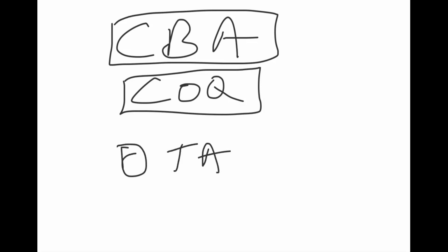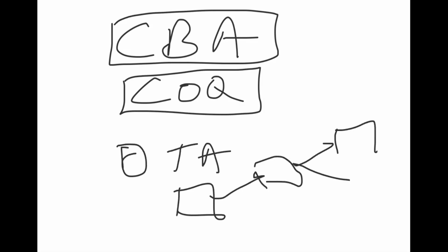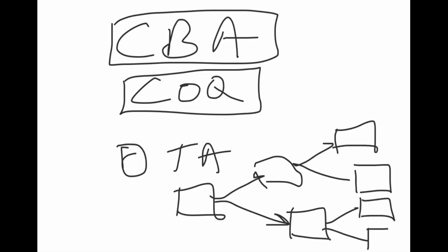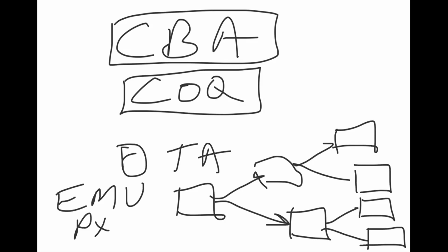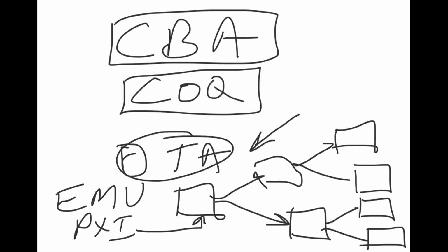And you do know that in the PMBOK guide, we have that very elaborate image that shows the breakdown to different alternatives. You got to be able to break down stuff and know your expected monetary value. It's probability times impact, and apply that to your decision tree. You also need to remember that in your decision tree analysis, we're thinking about profit quite a lot. We're not just looking at revenues, but you need to boil down the profit and multiply that by the probability.